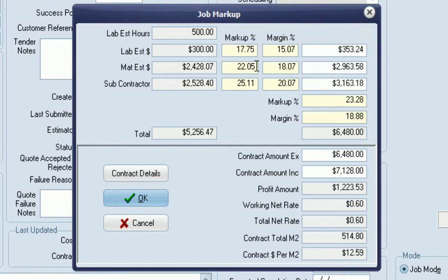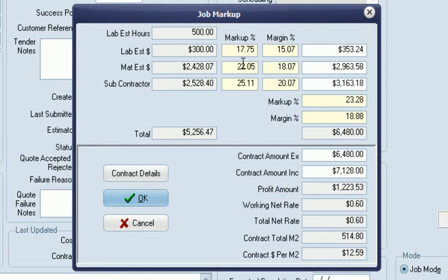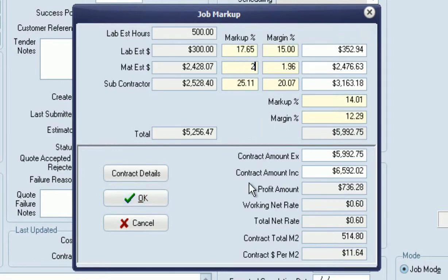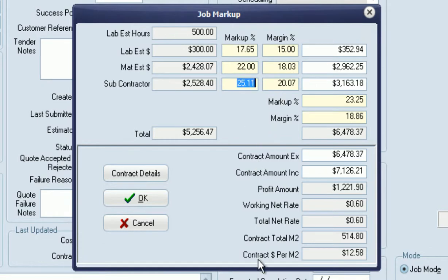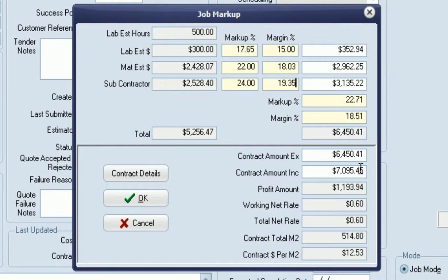The enhancements to the system in this area relate to the ongoing maintenance of the actual margins at these three levels. For example, if I put in a flat rate of 15% here, 22% there, and 24% there, that would give me a contract amount to the client of $6,450.41. If I now wanted to round this amount to a neat figure, let's say $6,480,